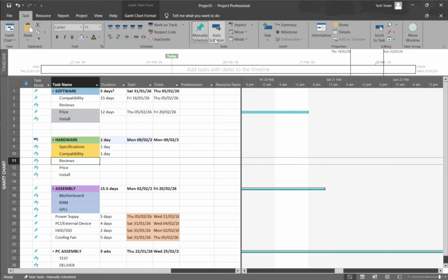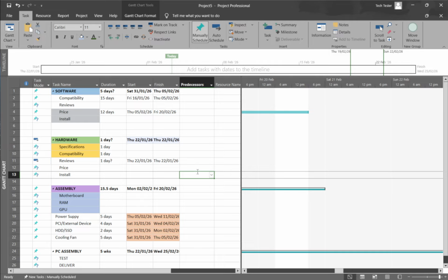Use Shift to select a range or Control to pick non-adjacent tasks before you press the button. If a button appears grayed out, make sure a task is selected and you're not actively editing a field. As you work, keep an eye on the task mode icons to confirm your changes, and remember that mode changes apply only to the tasks you select.